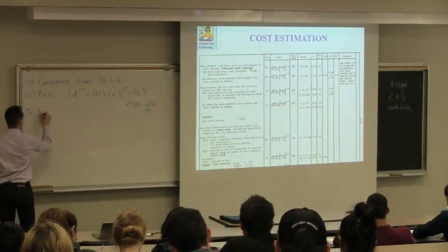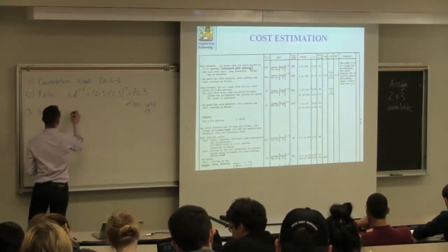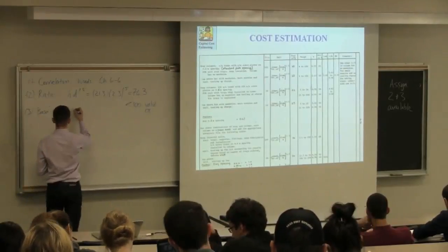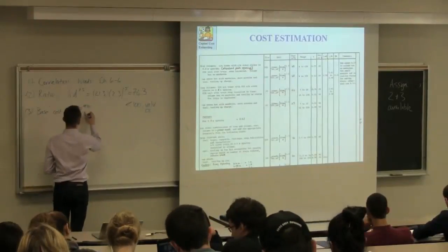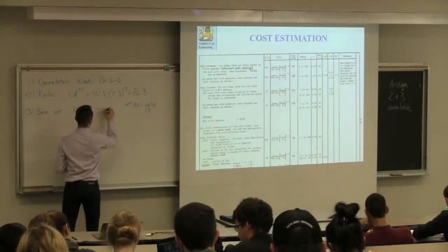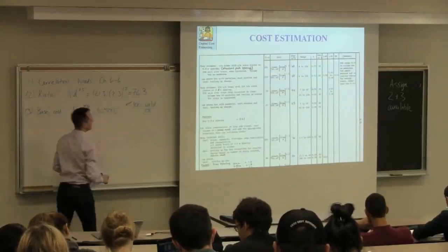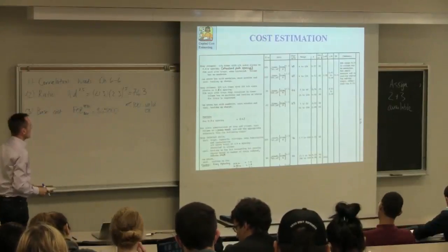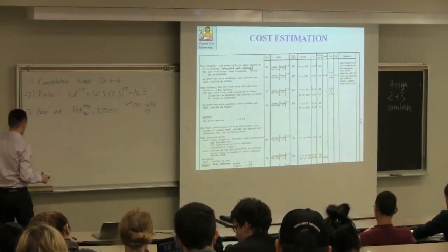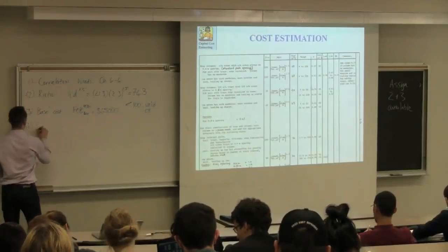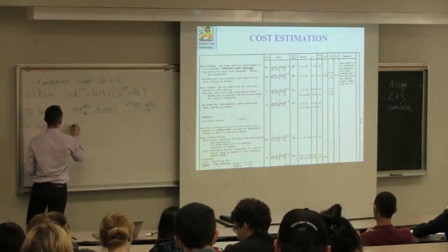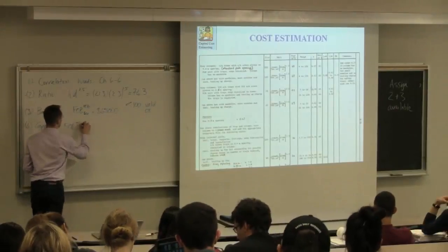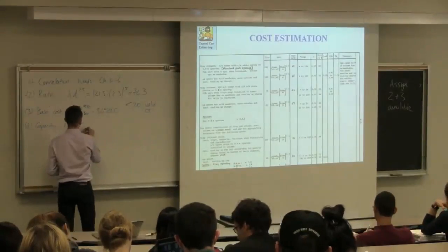The next step is to estimate the base cost in 1970. So that FOB in 1970 for the base is 65,000. Then let's bring it up to capacity for our requirements. So FOB in 1970 is equal to